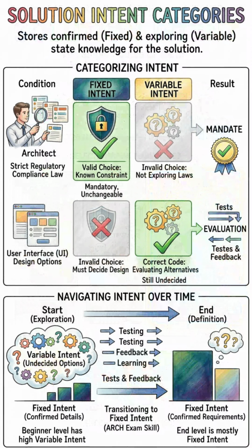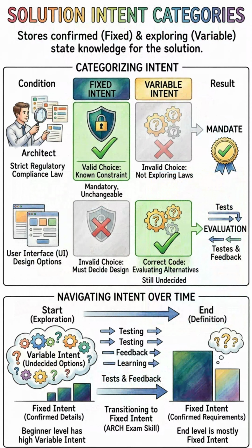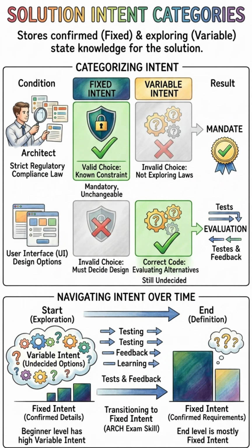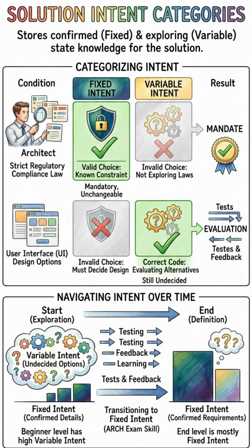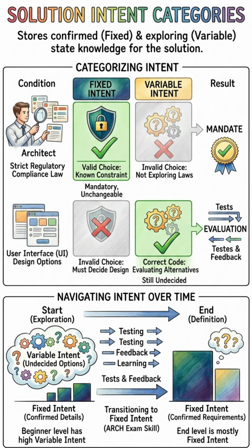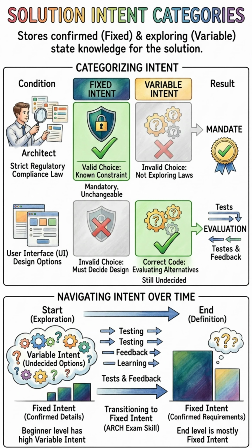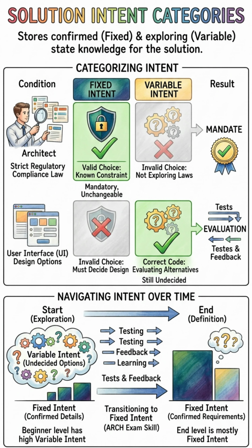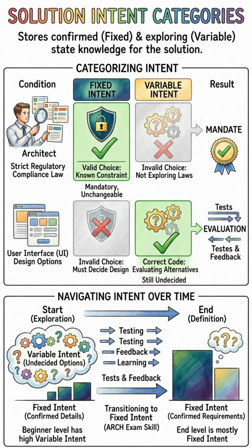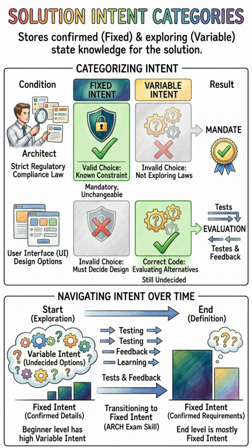Solution intent is divided into 2 distinct categories, which are fixed intent and variable intent. Fixed intent represents the things we know for absolutely certain, such as strict regulatory compliance laws or mandatory security protocols that cannot be changed. Variable intent represents the areas where we are still exploring options, such as the exact user interface design or the final choice of a database provider. The exam tests your ability to navigate the transition from variable to fixed intent over time.